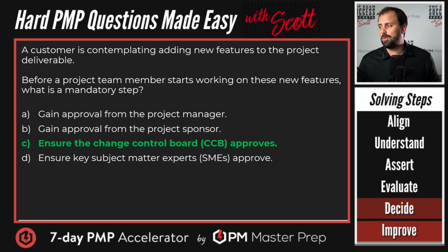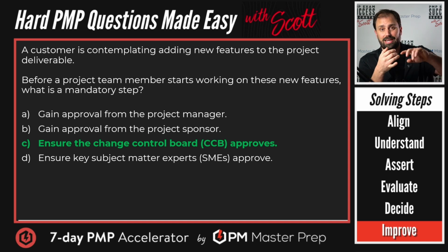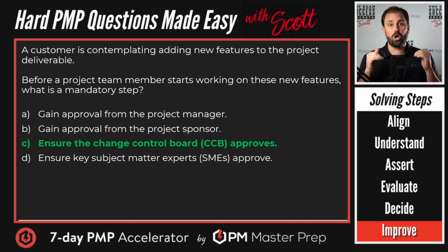Now, what can we learn? You got to nail down the processes for change. Believe me. Like I said, I have really distinct and detailed videos on how to manage change in our advanced question solving techniques and all through the Accelerator. So go through those videos. But you got to know that when we're in the waterfall world, we do not, as the project manager, have the authority to expand and contract the scope. We do not ask the sponsor to expand and contract the scope or the baseline, any of the baselines. All right. We have to go to the change control board.